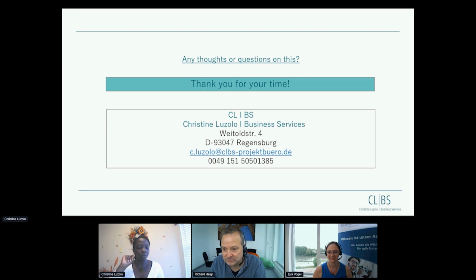Also, one important aspect that I find very often: the Scrum framework says a sprint should not be longer than 30 days. And I find very often that companies say, well, 30 days is too short term. This is especially the case with machine building companies that are used to way longer development periods and try to transfer to agile processes. The reason why this development period should be so short comes from software development, because they want to give their customers frequent updates.